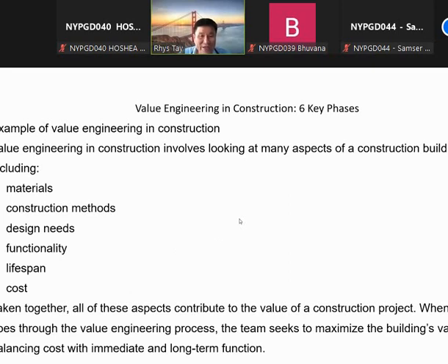Then the lifespan of the project, I think you know, project management has its beginning and the end. And at the end of the project, what sort of documentation you prepare, etc., etc. So you calculate the overall cost in each stage of the construction project. So you will know, okay, based on the master plan, what the cost is when you finish 50% of the master plan, 75% of the master plan. How much cost did your company incur? This will be used as a reference for your company, okay, in future.